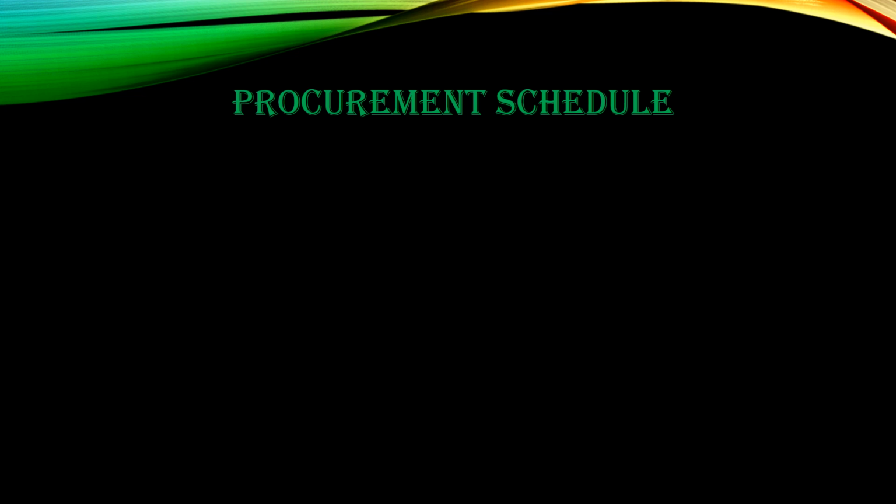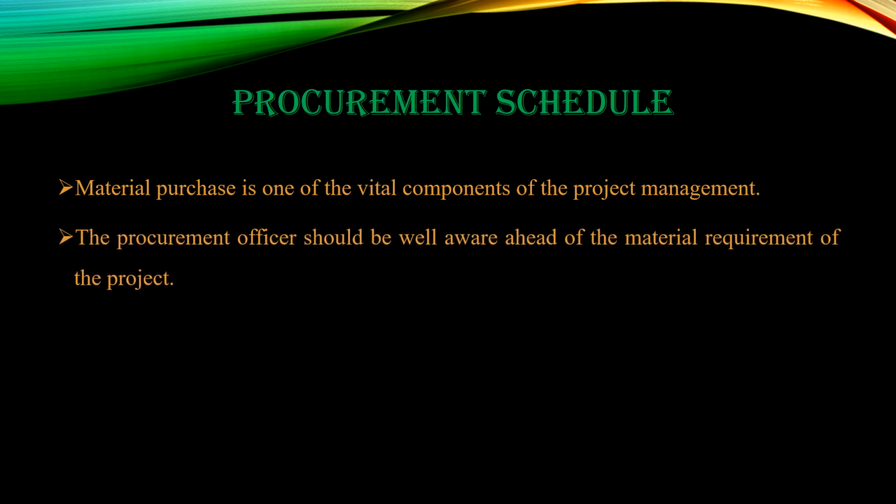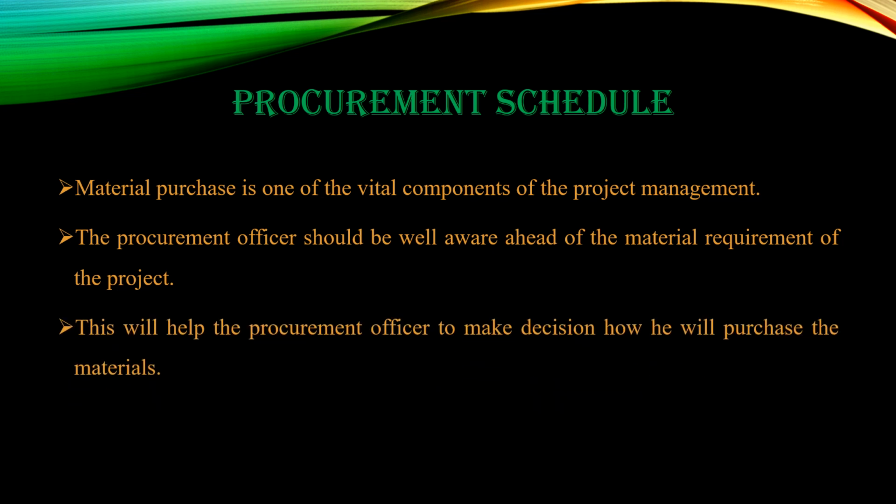Next is the procurement schedule. Material purchase is one of the vital components of project management. The procurement officer shall be well aware ahead of the material requirement of the project. This will help the procurement officer to make a decision on how he will purchase the materials. So a procurement schedule means the schedule that expresses the details regarding the various materials which are procured in the